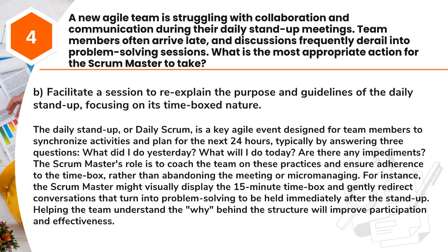What did I do yesterday? What will I do today? Are there any impediments? The Scrum Master's role is to coach the team on these practices and ensure adherence to the time box, rather than abandoning the meeting or micromanaging.